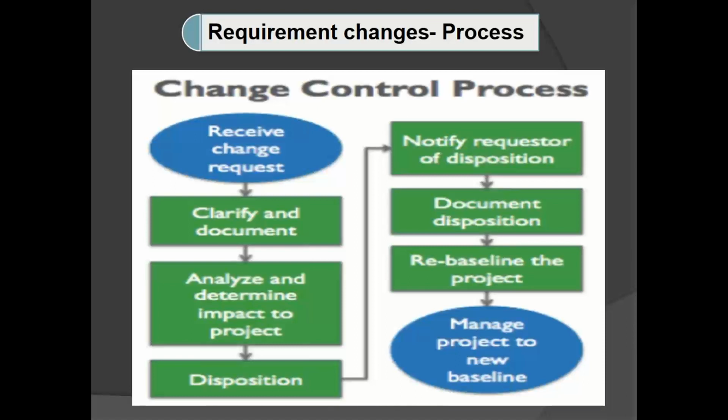In this discussion, we are going to mainly see 3 points. The first one is whether the change is a major, minor or medium change. Second one is, is it possible to do these changes at this point of time? Third one is, can we make the changes with the available resources or are any extra resources required?